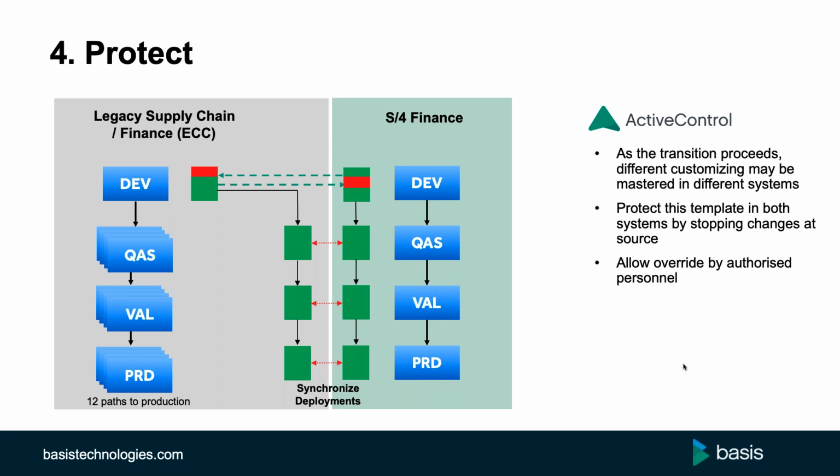We touched on this a little bit in terms of template protection, but imagine that you have a certain set of configuration, be it legal entity structure, tax codes, currency codes, what have you, that you only want to be mastered out of a single dev system. In this case, for example, the ECC one. The corresponding configuration on the S4 side, you would only want to allow that to be updated via the dual maintenance process, either with automated transports or in some cases, a small team who is allowed to manually dual maintain.